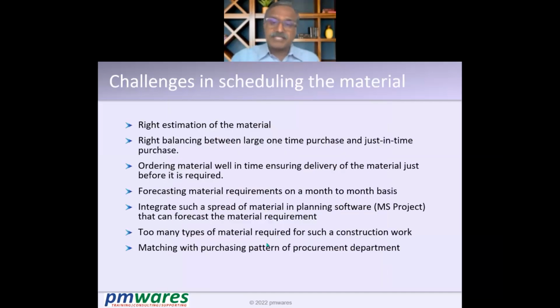Now, what are the challenges which we are trying to solve? First of all, the right estimation of the material, right? Second thing, balancing between the large one-time purchase and just-in-time purchase. So not everything is to be purchased just before it is required. Something has to be purchased in bulk and one time. For example, tiles.